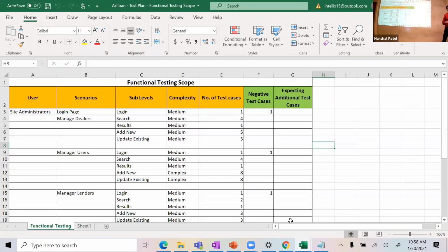And I'm showing you an example, and we can talk and debate it. But the way you can think about it is, let me take the system requirements document and break it down. What is the most common thing I'm going to test functionally? I'm going to pretend to be one type of user or another type of user and do the testing. So let me start there and say, how many different users am I testing? For each user, what are the high-level scenarios I'm testing? Because I could easily come up with that by looking at the document.